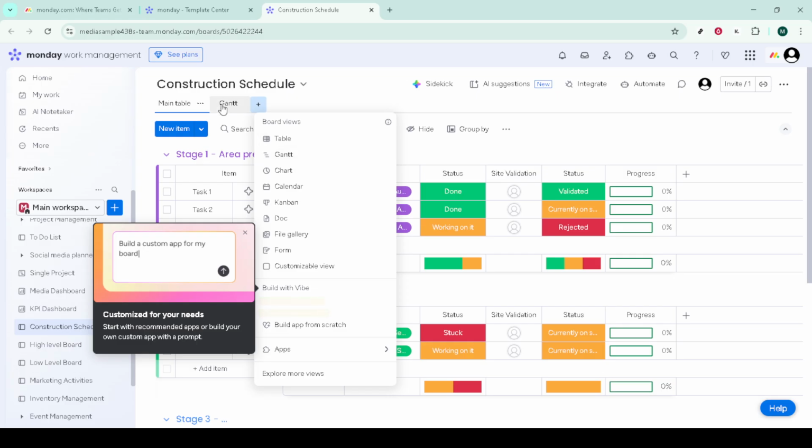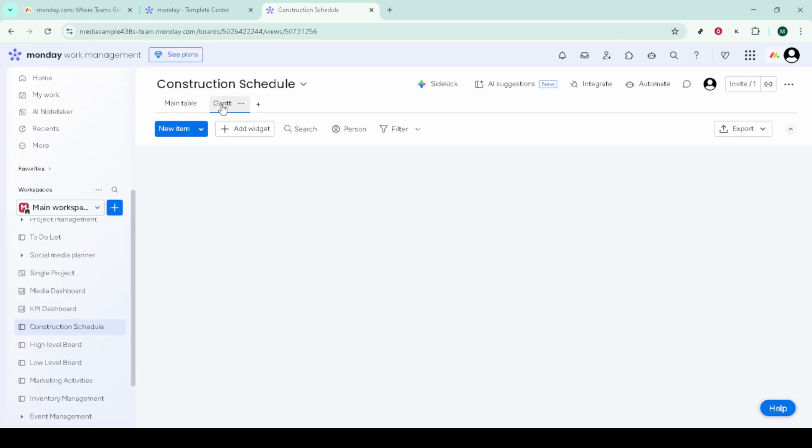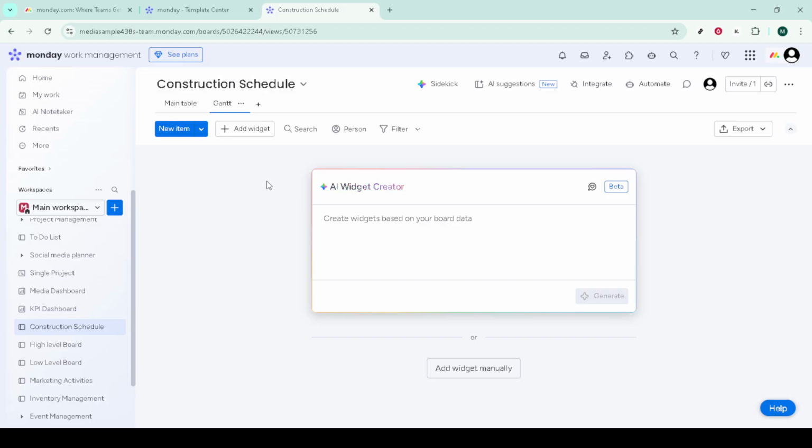For real-time updates, ask your field crew to update task statuses daily from the mobile app. They can change status, add notes, and upload photos directly to the item so the office has current information without waiting for end-of-day emails. Collaborate and automate to reduce manual follow-up.